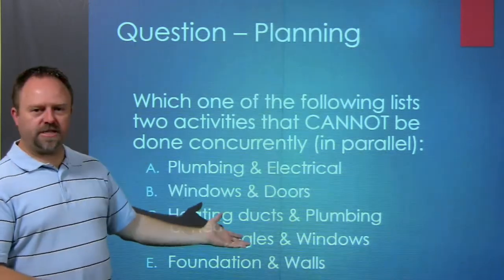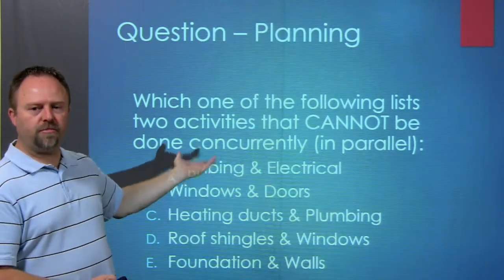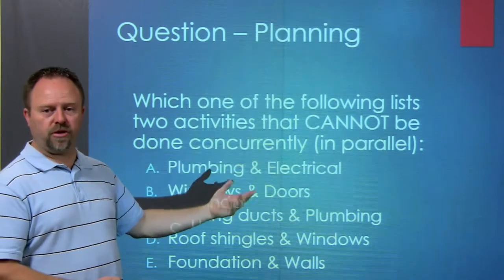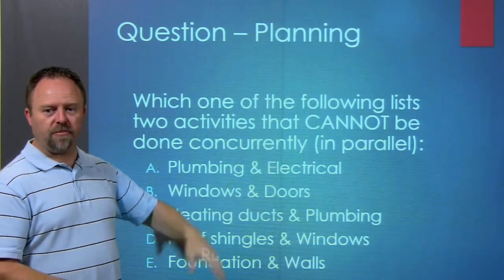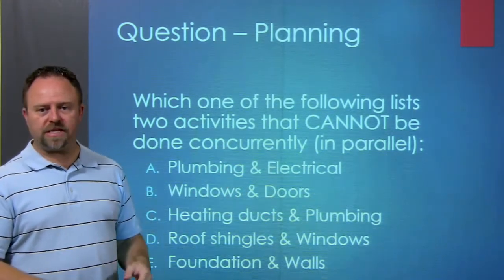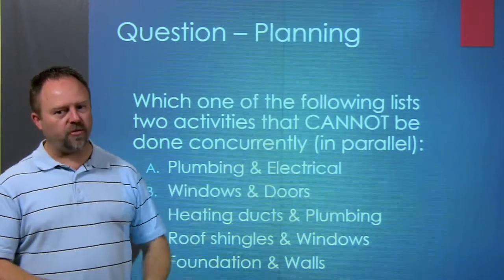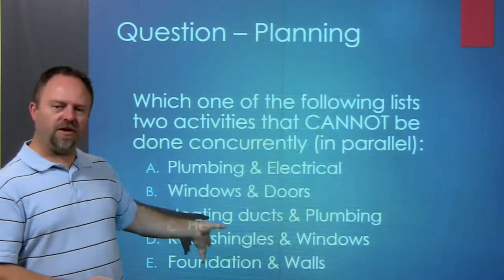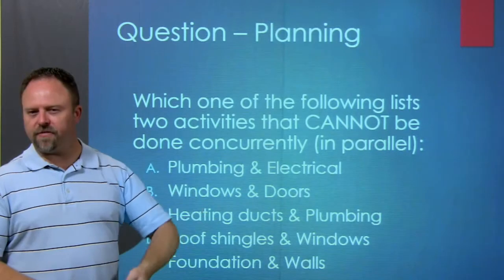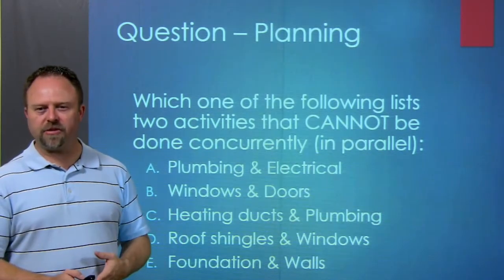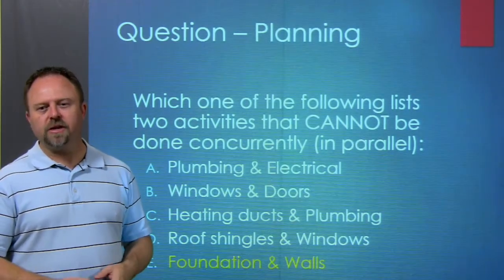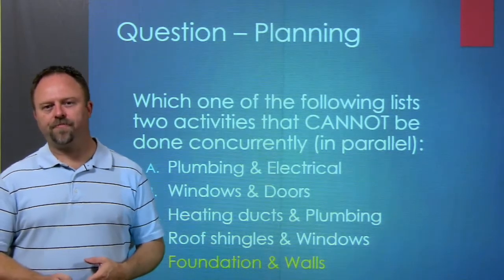So most of these things can be done simultaneously. You can put in the plumbing and electrical at the same time. You could put in windows and doors at the same time. Heating and plumbing you can do at the same time. You can put shingles up while you're putting windows in, but you probably can't put the foundation and walls in at the same time. So as you're making a plan, you have to know what things can be done simultaneously or concurrently. So that one wouldn't work very well.